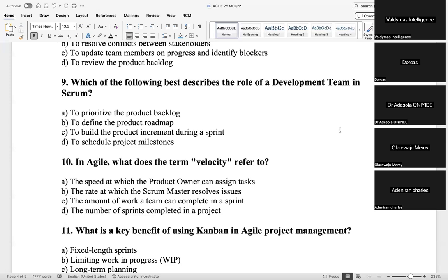And in such a case, sometimes we may even have to break down that 55 for him and say, okay, instead of getting this single story into the sprint, why not let's break it down into further stories? That means that's not a user story already. That's already becoming a feature. Let's break it down further into stories.